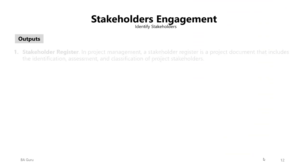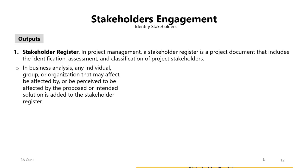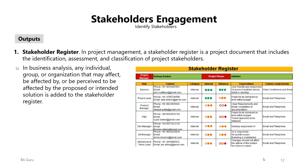The key output of this process is the stakeholders register, or product stakeholders register. In project management, the stakeholder register is a project document that includes the identification, assessment, and classification of project stakeholders. In business analysis, any individual, group, or organization that may affect, be affected by, or be perceived to be affected by the proposed solution is added to the stakeholder register. An example shows how to document the role, contact, category, interest level, influence level, expectations, and requirements.